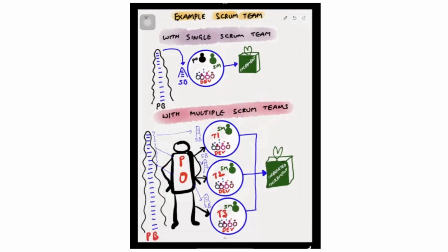By the end of the sprint, they will create an integrated increment. This integrated increment will be taken to a joint sprint review meeting in which they will showcase the features of the integrated increment of all three teams to stakeholders, and their feedback will again be mapped into the product backlog through prioritization by the product owner.